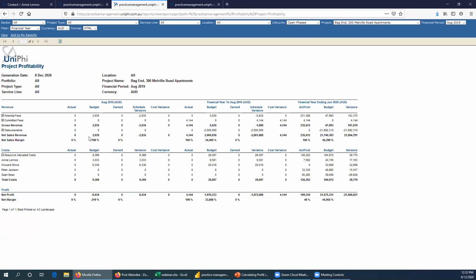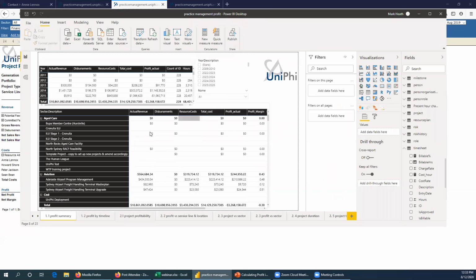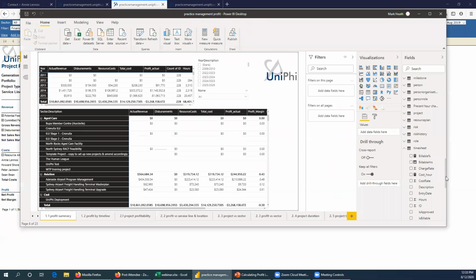And so they're using it as a proportion of the standard hours multiplied by the salary, so that they always get the salary cost in there for resource cost on a project, not any inflated cost based on an excess of hours. So that's another methodology you can use. If you're going to use that and you wanted standard reports to be run out of the system, you'd need to contact us. Otherwise, you can start to use the Power BI interfaces to start to build that up, and you have the ability here.